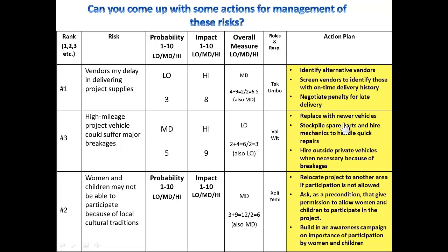On the problem with the high mileage vehicles, a manager could simply replace the vehicles. He or she could stockpile spare parts and hire mechanics so that they're ready to fix the problems, or hire outside private vehicles when necessary because of the breakages.